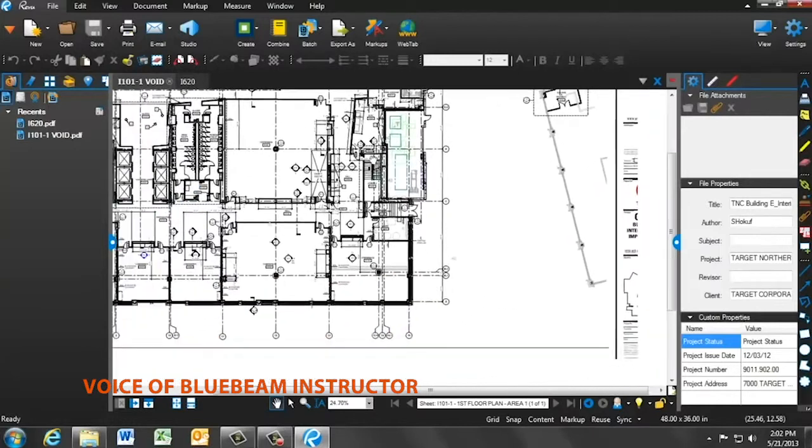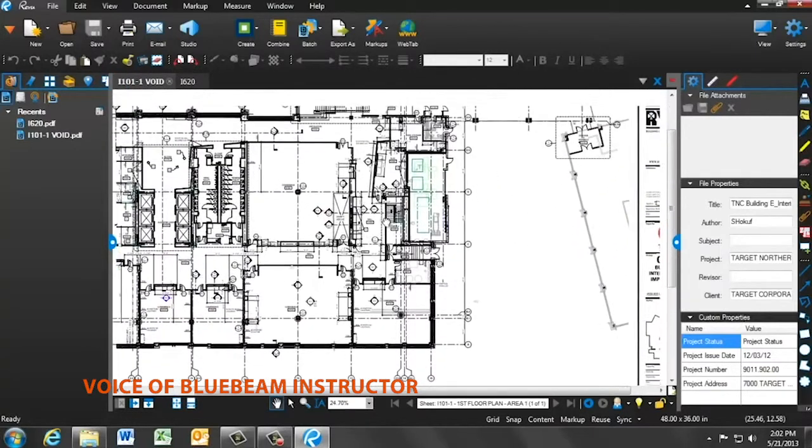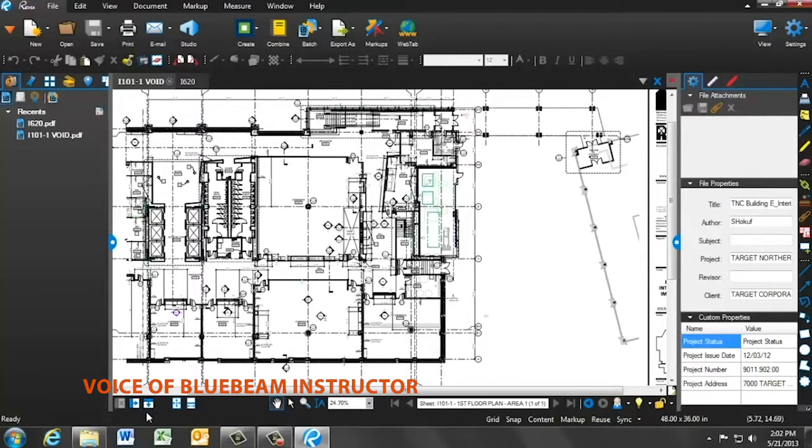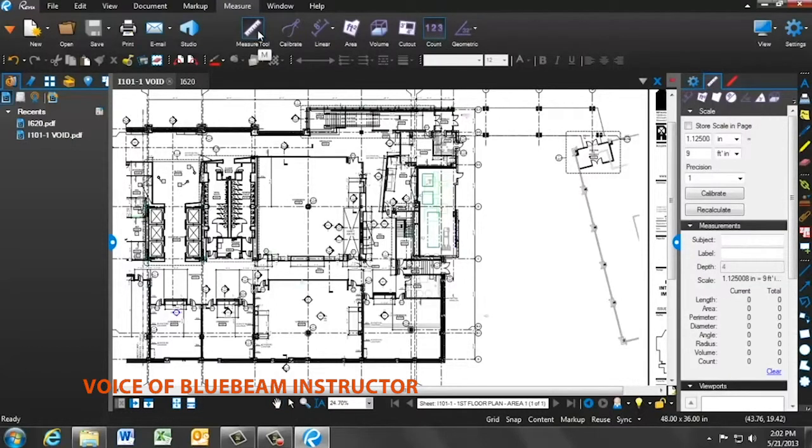We are first going to discuss the Measurement and Takeoff toolset. Bluebeam Review has some of the same skill sets as on-screen Takeoff. On the right-hand panel, click on the purple ruler. You can also select Measure Tool on the top toolbar. First, Bluebeam needs to get a measurement of the scale for the document. Click on the Calibrate button and pick 2 points with a known length.